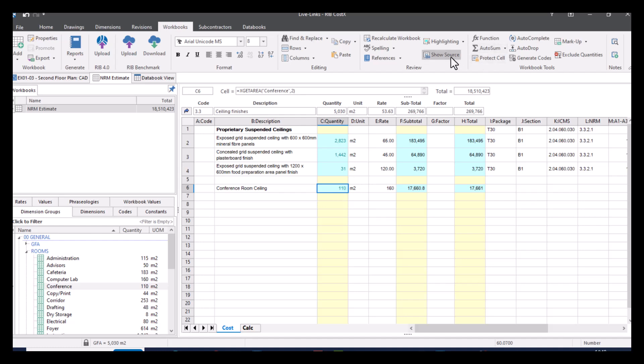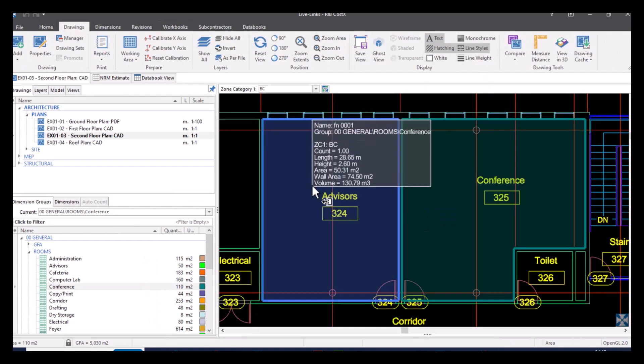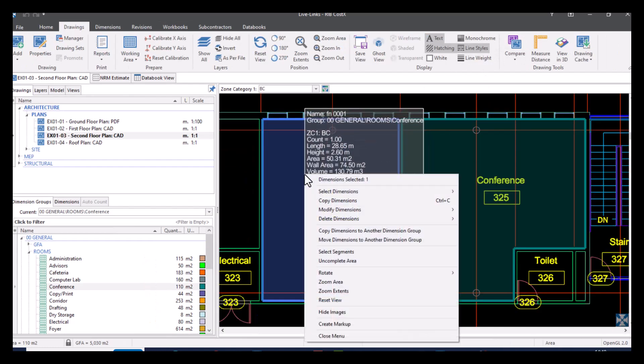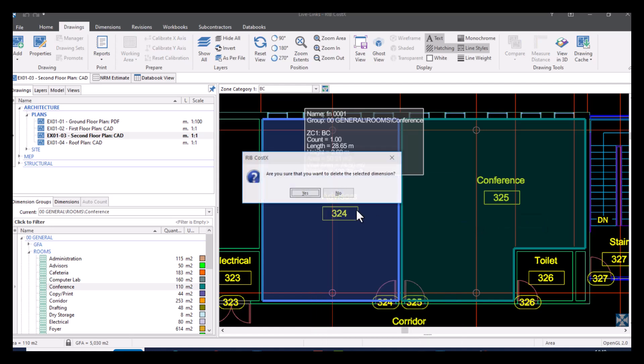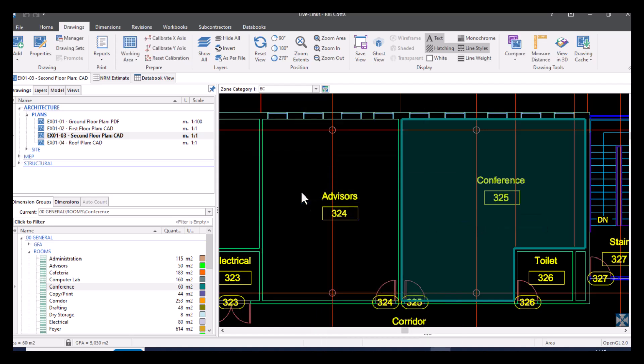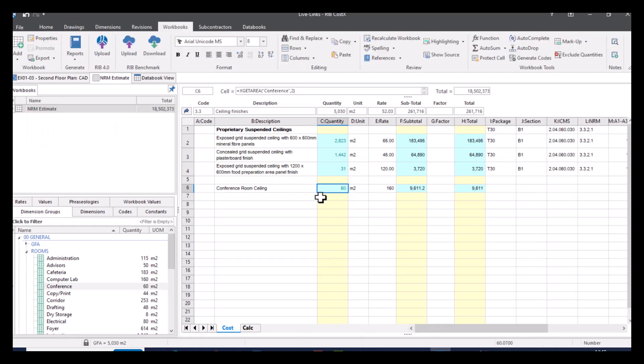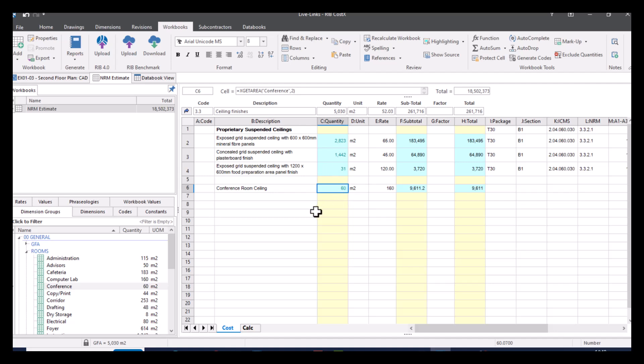If I go back to my workbook view, we can see this has automatically updated to the latest value. So once again, I'm going to go to show source. I'm just going to delete this area. I'm going to go back to my workbook and you can see once again, it's gone back to the 60 metres squared, which is the accurate information. So because of this show source button and because of the live link, anything that's updated will automatically update here. This allows you to just freely do your quantities and not have to manually update everywhere that possesses that quantity in your workbook.